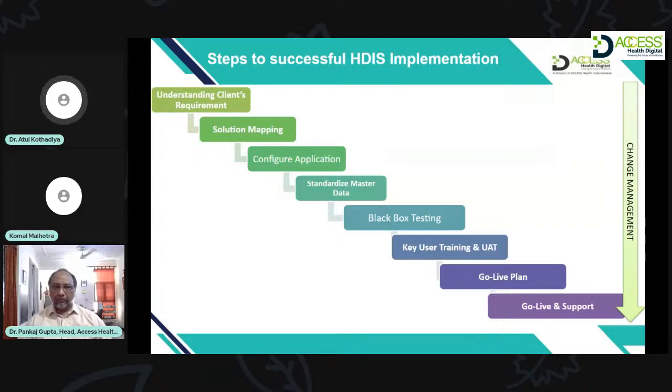Third was the genetics department, because the genetics report turnaround time was 10 to 12 days. So we had enough time in hand. Even if there was an issue, we could fix it within that time span. So we took a phased approach, implementing the LIMS software in that biggest lab.